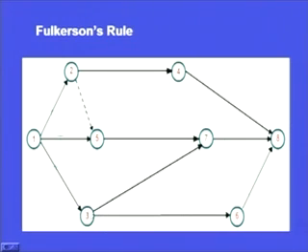So, now we have two nodes, 2 and 3, in which there is no arrow coming in, but there are only arrows going out. So, we start from the top. So, this is at top. So, we number it as 2 and this is numbered as 3, and all the arrows going out of these two nodes are then struck off, like this is also struck off, struck off, struck off, struck off.